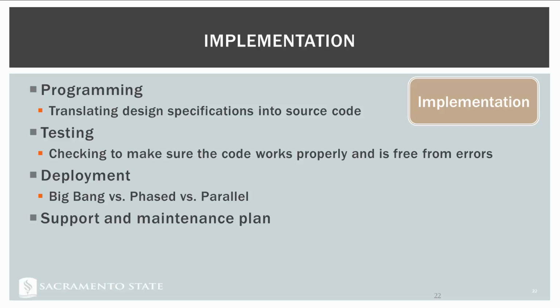Let's go to the parallel first. So the parallel deployment process, what that one means is we leave the existing system up when we turn the new system on, and we run both of them at the same time. Now, here's the problem with that: sometimes this leads to even worse resistance as people continue to use the old system and revolt and not decide to use a new system.